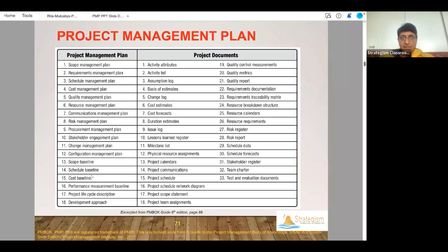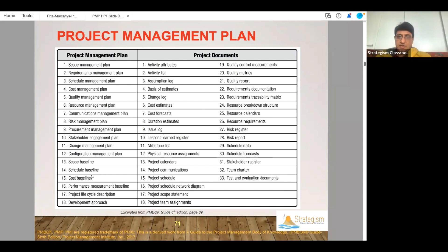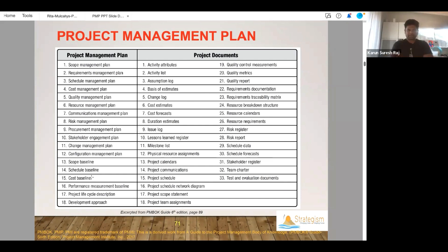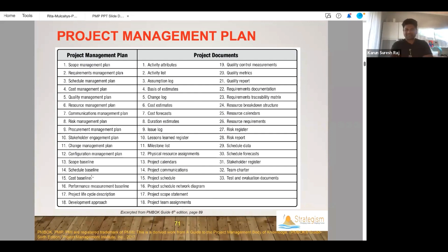And plans — how many plans are there? So many plans. 18 of them. How many documents? 33 of them. So, if you meant cost management plan, that's different. But cost estimates is a document. The cost forecast is a document. Budget — something related to the budget — is part of the cost estimates.